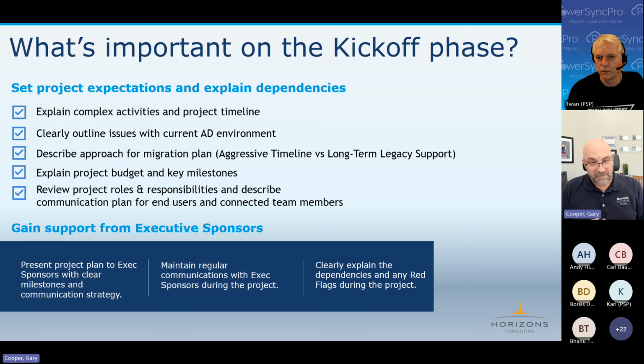It's very common in organizations to shortchange the planning and testing phase and try to get right to the implementation phase, because a lot of executives think, and I hear this a lot, that as soon as my email domain changes and I'm now Gary at abc.com instead of xyz.com, I'm done, right? No, that's just one piece of it. There's a lot more to it than that. So what do the timelines look like? Planning and testing is going to be a significant chunk of time. It should actually be longer than implementation, to be quite honest.